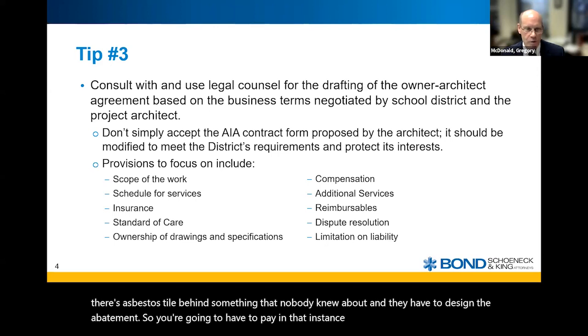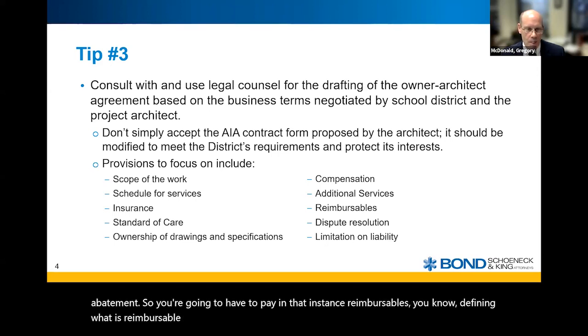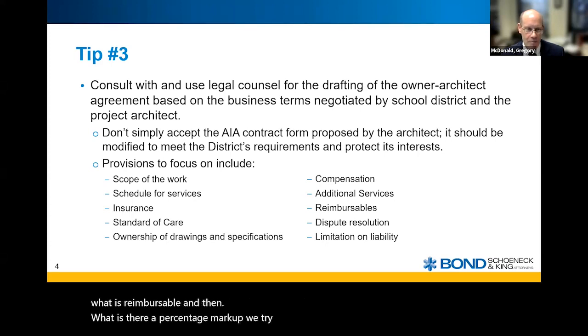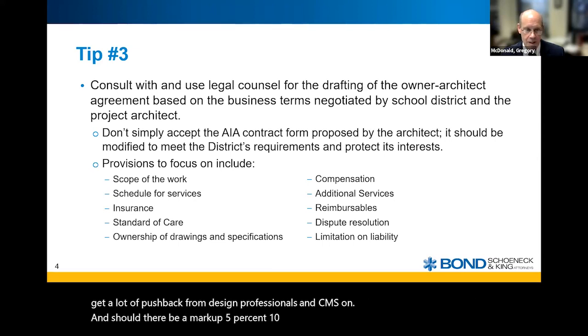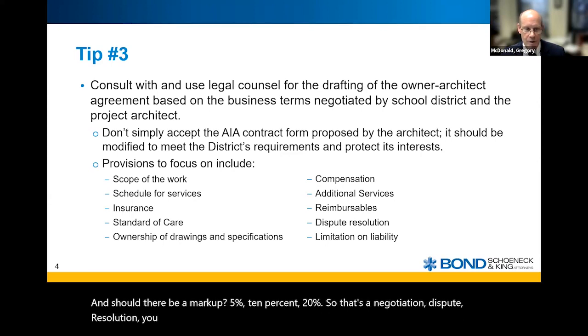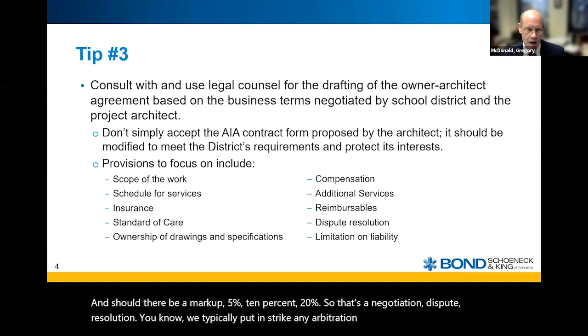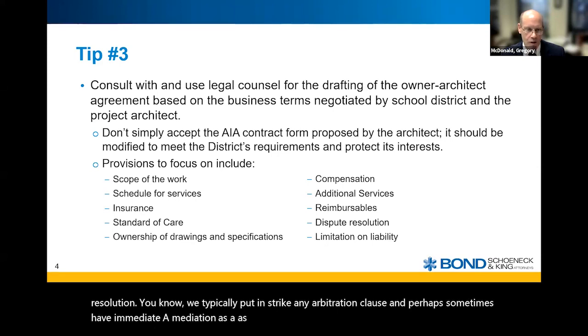Reimbursables: defining what is reimbursable, and whether there is a percentage markup. We try to limit the markup to no markup, at cost, but you get a lot of pushback from design professionals and CMs on whether there should be a markup of 5%, 10%, 20%. So that's a negotiation. Dispute resolution: we typically strike any arbitration clause and perhaps sometimes have a mediation as an owner option before litigation.